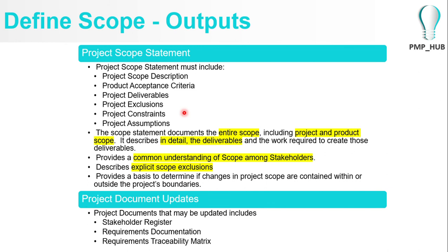In this process of defining the scope, again, sometimes you might find new stakeholders, and as a project manager you might have to update your stakeholder register. We will cover how to handle stakeholders in a later class, but for the moment, you might come across new stakeholders with new requirements when you are trying to refine the scope. So your stakeholder register can get updated.